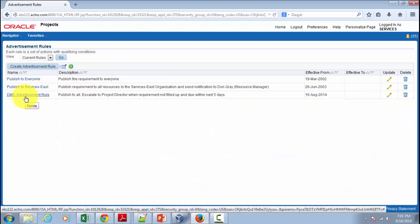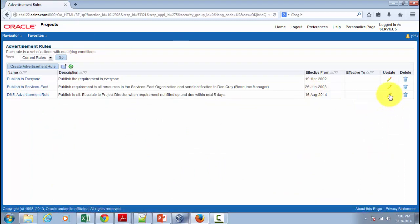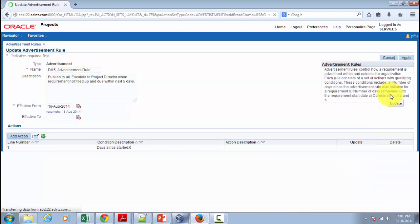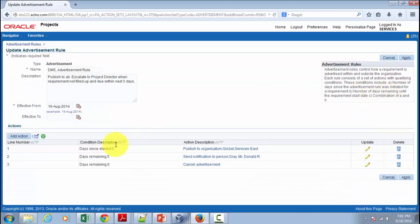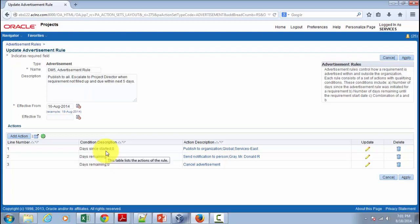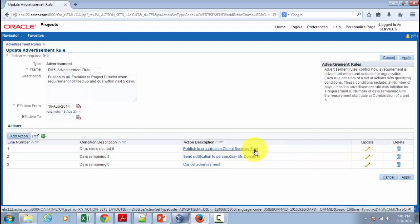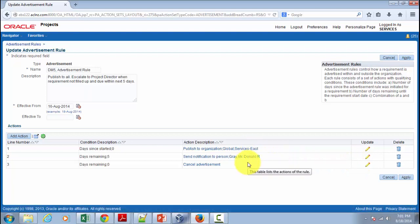And that's the advertisement rule that we defined. So if you open this, we define three actions. One is to publish to the entire organization for Services East. Second is send a notification to Gary Donnell before five days of the requirement closes. And lastly, simply go ahead and cancel the requirement automatically if at all it is not filled.